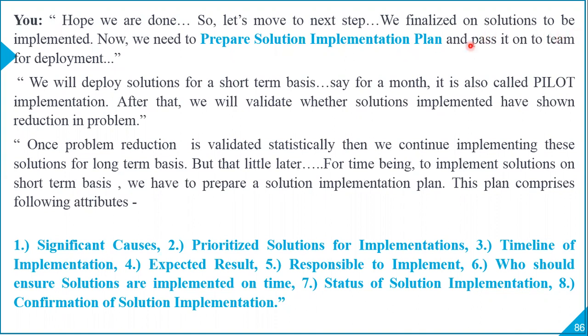We finalize on the solutions to be implemented. Now we need to prepare a solution implementation plan and pass it on to the team for deployment. Team means the operations team. We will deploy solutions on a short-term basis, say for a month, which is called a pilot implementation. After that, we will validate whether the implemented solutions have shown a reduction in the problem. In other words, whether solution implementation gave a certain improvement in performance or not. Once problem reduction is validated statistically, we continue implementing these solutions on a long-term basis.